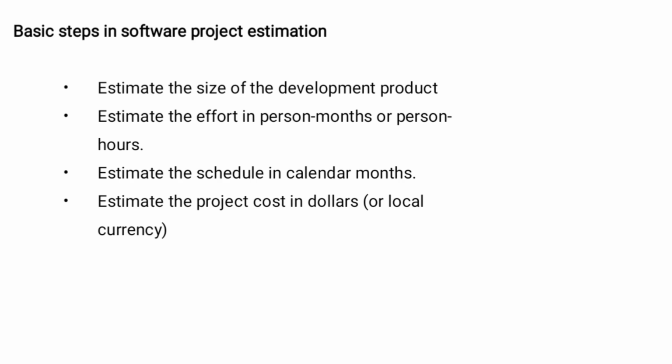Basic steps in software project estimation. Estimate the size of the development product. Estimate the effort in person, month, or hours. Estimate the schedule in calendar month. Estimate the project cost in dollar or the local currency.